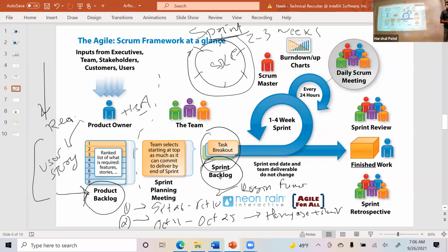Then they will also identify the tasks for every story. So it's a 4-hour long meeting, right? And you have 4 stories. So generally what we do in real life, we work through one story at a time. We say, okay, what needs to happen in order to deliver the story? So it's more like a design session, plus high level QAs will provide input for their test cases and so forth as well. Come up with the high level acceptance criteria and all those activities that happen here. Okay. And then they will start clearing the tasks, who is doing what, and if there are 2 developers, what tasks they will get, everything happens right there. Okay, so task breakup.